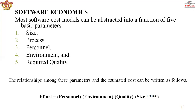The relationship between these parameters and estimated cost can be written as: Effort = Personnel × Environment × Quality × Size^Process. This is the relationship between the five parameters when evaluating software economics.